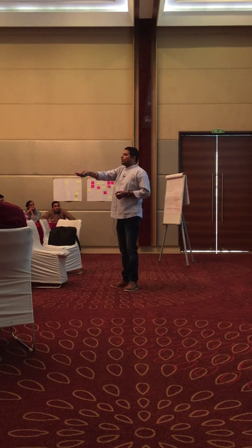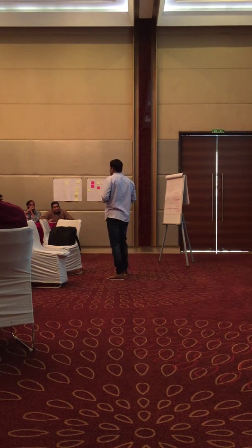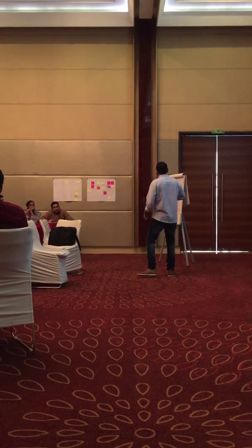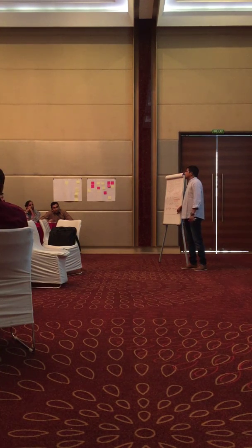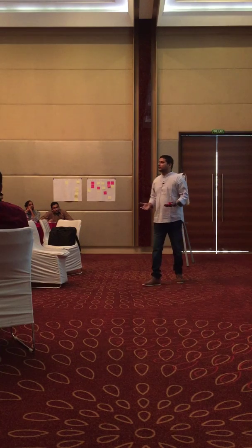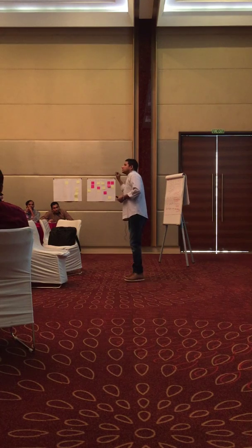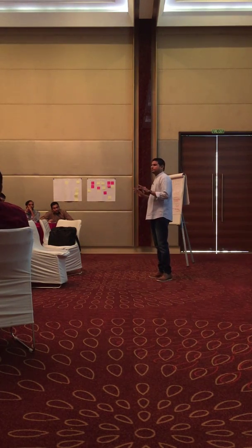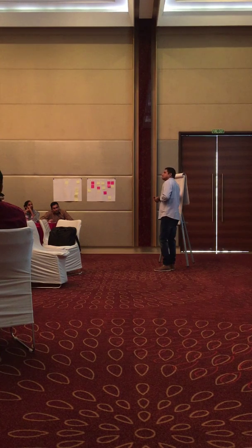Can you please give him a round of applause? The fundamental characteristic for prioritization is business value. So if you do not mention that in this statement, nobody can understand why something should be prioritized. Right? Now, should you follow the same thing for all kinds of backlog items? Not necessarily. If you want to fix a defect, writing 'as a developer, I want to fix this login defect so that' is not required. The same goes for infrastructure and technical issues. Only functional items have to be represented in this manner.